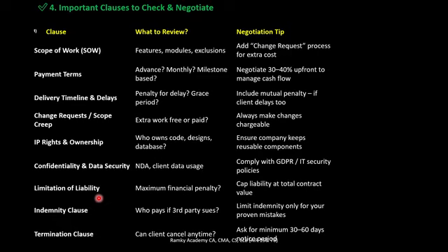If we don't fix 12 months fee payable or 18 months or 20 months fee payable for the entire liability, if you agree to unlimited liability, then the supplier may go bankrupt as well, right? So this should be fixed, and this has to be negotiated always with the customer, because the customer